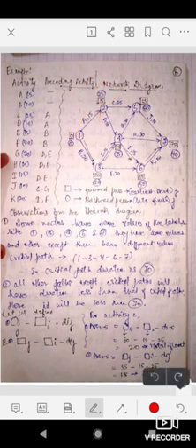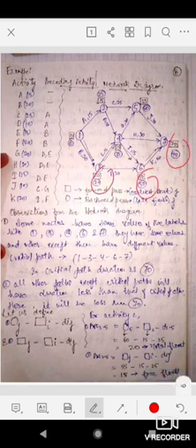Observations from the network diagram. What we can observe from this network diagram is that some nodes have the same value in both labels. Some nodes have 20-20, 50-50, 70-70, 35-35, and 0-0. These 5 nodes have the same time in both circle and square, but we have 2 nodes here with different times inside circle and square.